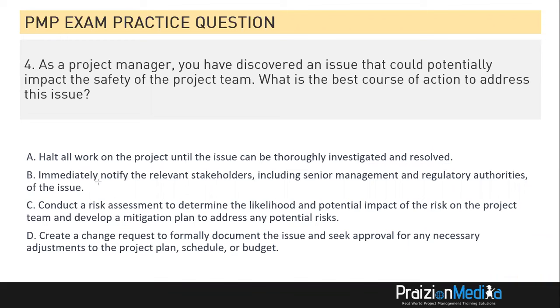That may not be the best thing to do immediately, but let's take a look at B and see if B is better than A. B says, immediately notify the relevant stakeholders, including senior management and regulatory authorities, of the issue. It's not a bad thing to do because we need to escalate things that could affect safety. That is very important. So halting all work, though it sounds noble, is not the best thing to do. Even better is alerting people, and they can take the necessary steps they need on a localized basis.